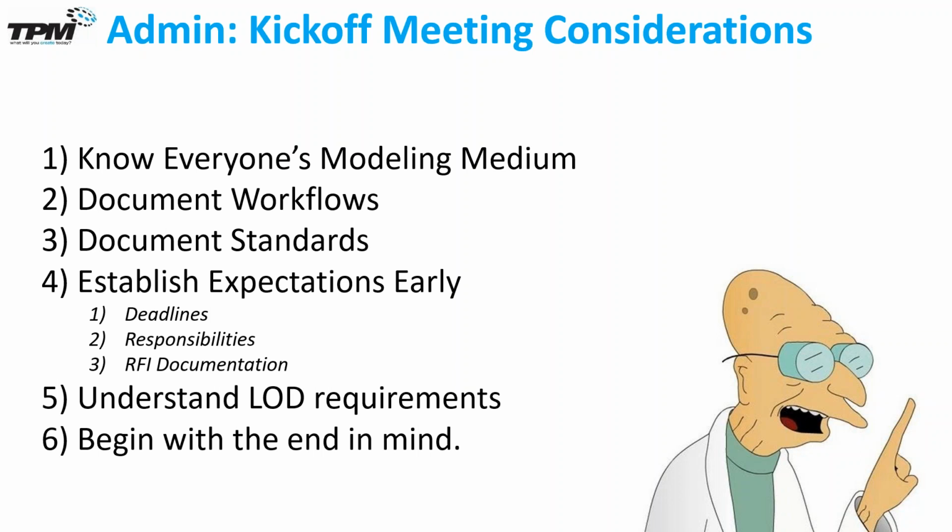Second is documenting your workflows. Just like we saw on the previous slide, it's important to document the workflows. Like, how are we going to be resolving these issues, right? How are we going to be sending files out, files going in and out, things like that? And how are we going to be resolving issues, documenting those issues, things like that, right? That needs to be written down and understood by all the team members, right? Otherwise, you'll end up in situations where one team member who may or may not have gotten that email that said, please put your markups in here for clash resolution purposes, all of a sudden is creating more work for the project team than they are contributing to the project team. Document your standards, and this includes naming conventions, which I'll come back to in a second, because naming conventions are kind of a soapbox of mine.